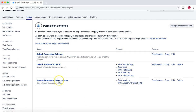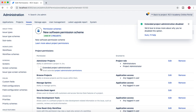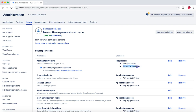So we have three different permission schemes. If you want to extend the project permission for a particular scheme, you can just go to that scheme, and under Administer Projects, by default there is an ability to administer the project. But if you check the box for extended project administration, it will enable the people in the project administrator role to edit the workflow as well as screens up to some extent.